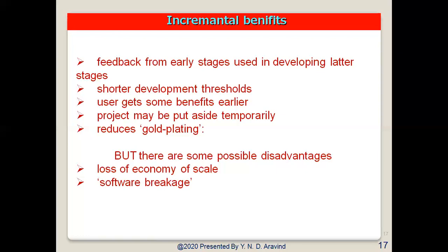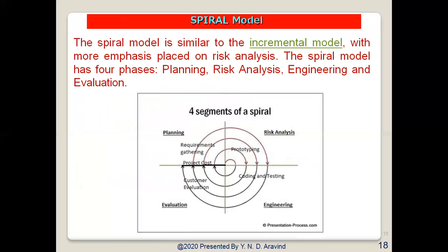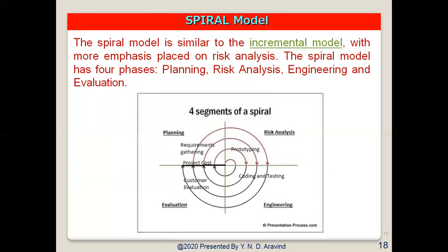Since some modules will be completed much earlier than others, well-defined interfaces are required. Difficult problems tend to be pushed to the future for the demonstration of early success to management. Because of this, there is great software breakage. So these are the disadvantages of the incremental model.